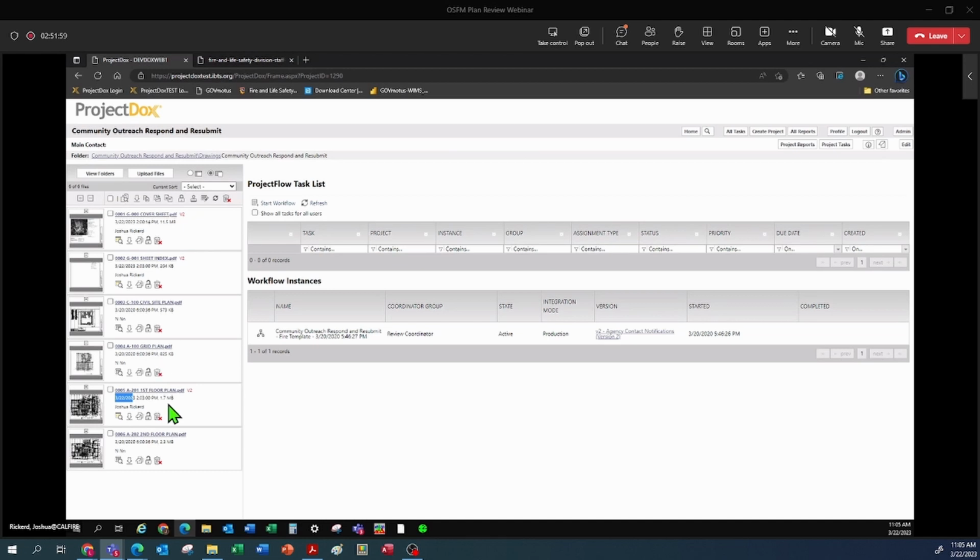So hopefully all that made sense in terms of what we're looking for with versioning indicators and the issues with file names. So another thing with file names is, what if you want to change this to say this was actually supposed to be the 3rd floor? You cannot change the file name and have it proceed forward, especially if we had a plan review comment on that sheet.